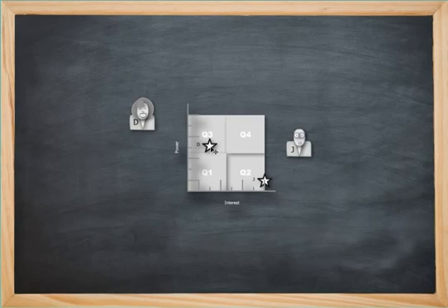Stakeholder D is in quadrant 3, which is basically high power, low interest, and all they probably need to be is informed. Detail isn't quite as important to them, but be aware that they can help. We call them cheerleaders. So that's what this stakeholder is all about. Stakeholder J is in quadrant 2, which is low power, high interest. The more detail, the better, and they tend to be your backers.